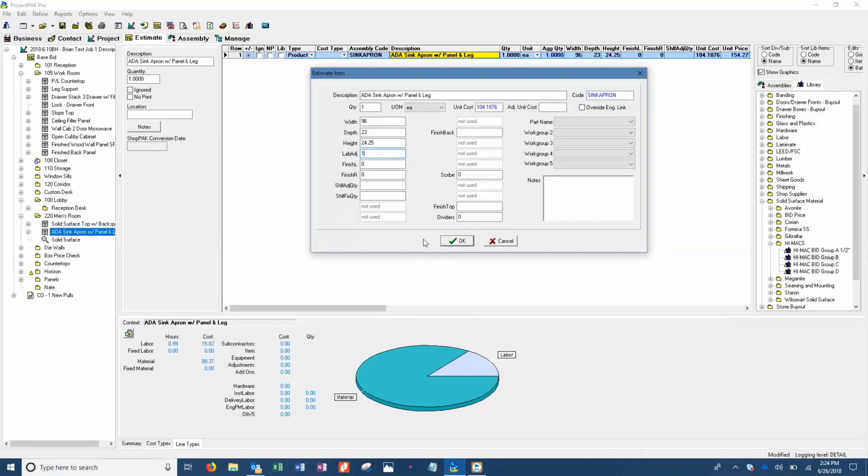If it was 100 to 200, it was this. And you can do that under the labor curving. Most people don't do that. They just do it on a job-by-job basis like this, where it's like, I know I'm doing a ton of these, or I'm not doing enough of these and I want to increase it because I want to play with it. The other thing you can always do is pull in a little more labor and pad something. If you ever feel uncomfortable about anything, drag in a little more labor so that you've got that information.